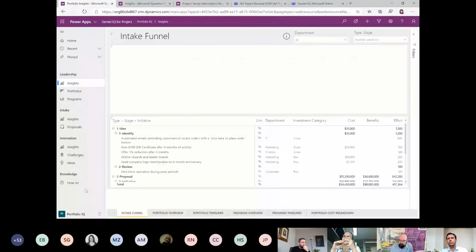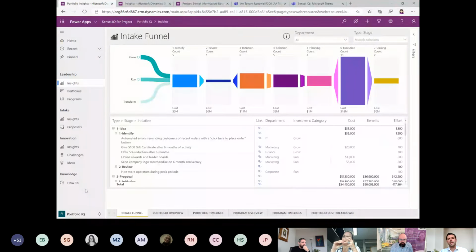From the initial stages, we try to make sure that getting a product set up doesn't require too much overhead, so that things can step through the initial phases of ideas and idea generation before they get kicked into the full end-to-end scheduling and planning process. And we try to make sure that anything that isn't going to go ahead gets stopped pretty early, so we don't waste too much energy on it.